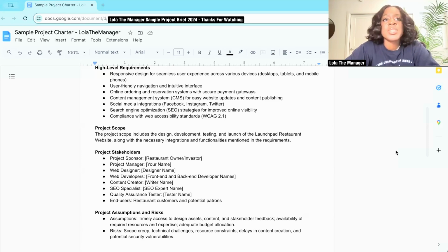And scope creep is so subtle because it may be something that your team can do in a few minutes. But if every day you're adding something that can take a few minutes, it's going to veer you off track. But also, as a project manager, you need to make sure that you understand that you are managing three things: scope, schedule, and budget, or scope, schedule, and cost. So just because something doesn't necessarily impact the scope as much, it may impact the schedule or the cost. So that scope creep ended up hurting us in our costs, and we don't want that.